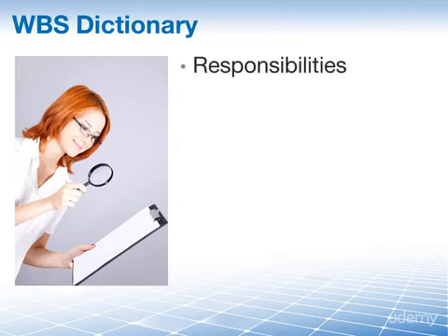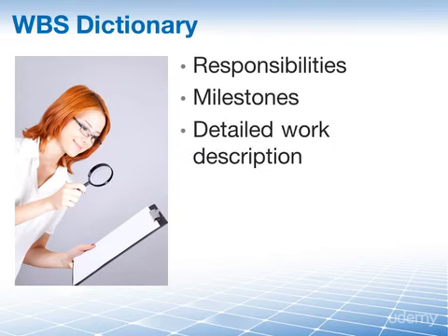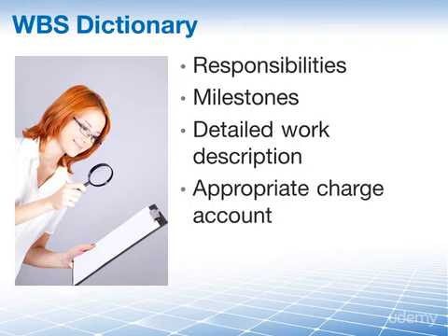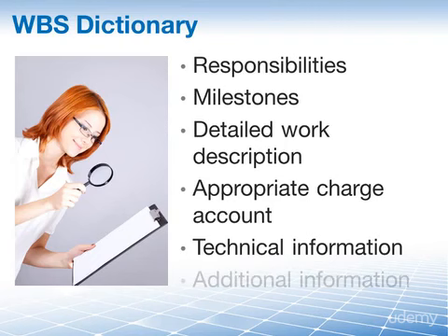It contains responsibilities, milestones, a detailed description of the actual work that has to be performed. You'll find the appropriate charge account in here. You can also find technical information and really any kind of information that is needed for the assigned team member to complete this particular work package that you are now looking at, which is defined in the WBS dictionary.